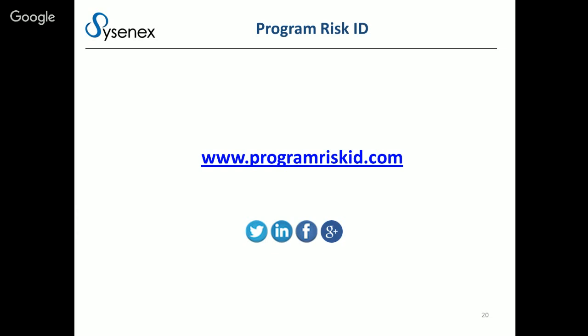So when you are identifying your vulnerabilities, the user, someone knowledgeable about their program, goes through the 218 and makes choices about where they're at with each risk item. So now you can see where you're hanging out. We always say if you have a level 3, 4, or 5, you should go back and look at that. And based on your program priorities, now you can decide, okay, which ones do I need to address first, second, and third, and now you're playing with a full deck.